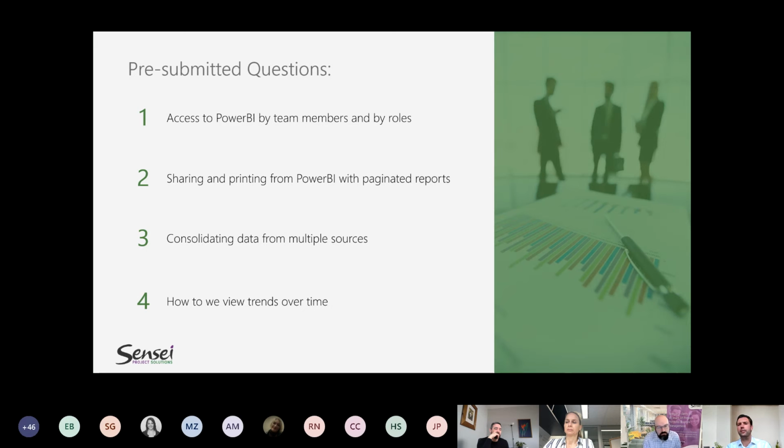We still realize there's that need for point in time data. So to say, this is what it did look like at the end of the month. So we try to have some elements in there for tracking what happened at that point in time to save it there. And so we have some options for that around snapshotting and taking status report dates and to track what it was that date. But yeah, there's often some requirements still that need a print off of pages.